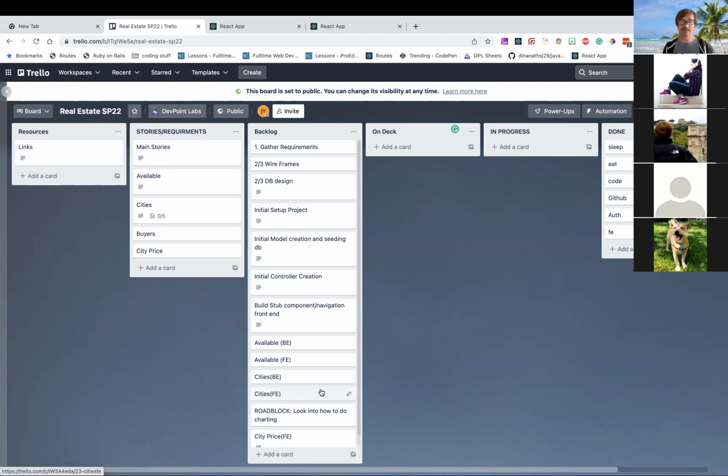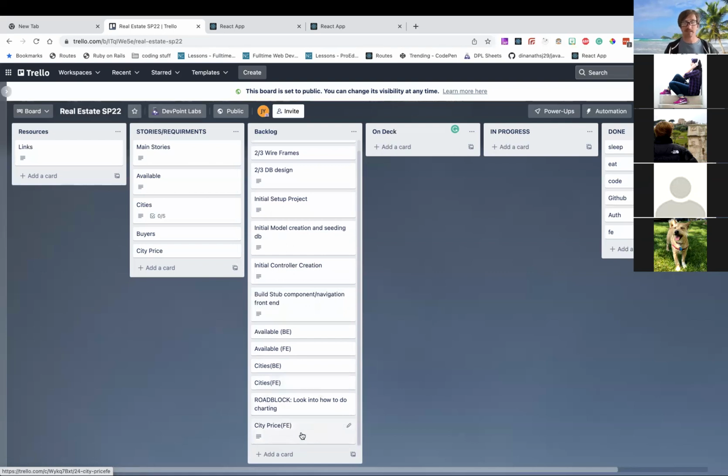So I think when you're really thinking about what you want to be doing and how long it's going to take, as a developer, you don't want to be like, oh yeah, this is going to take a year, because then they'll be like, okay, well, you should probably not be working here. But at times you can give yourself some protection, some padding, with the expectations from the company or from the project manager. And just be upfront. It's like, I don't know. I've never done charting, so I can't give you a time estimate because I don't know. So err on the safe side when you're guessing time.